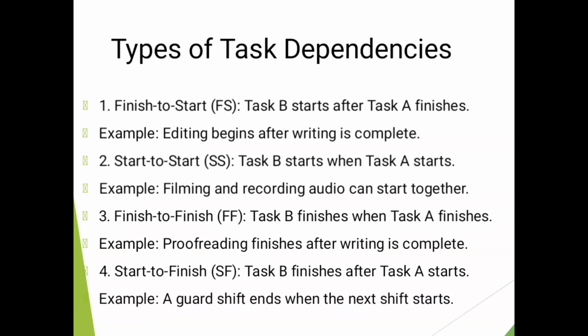Another type is start to finish. This is where task B finishes after task A starts. An example we have on that one is a guard shift that ends when the next shift starts.